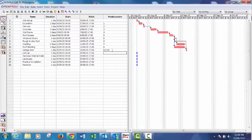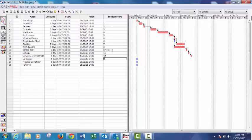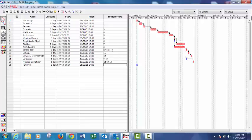Lock up eleven. Services internal trade twelve. Landscape nine and ten. Practical completion twelve, thirteen, and fourteen. And then handover, we need practical completion.